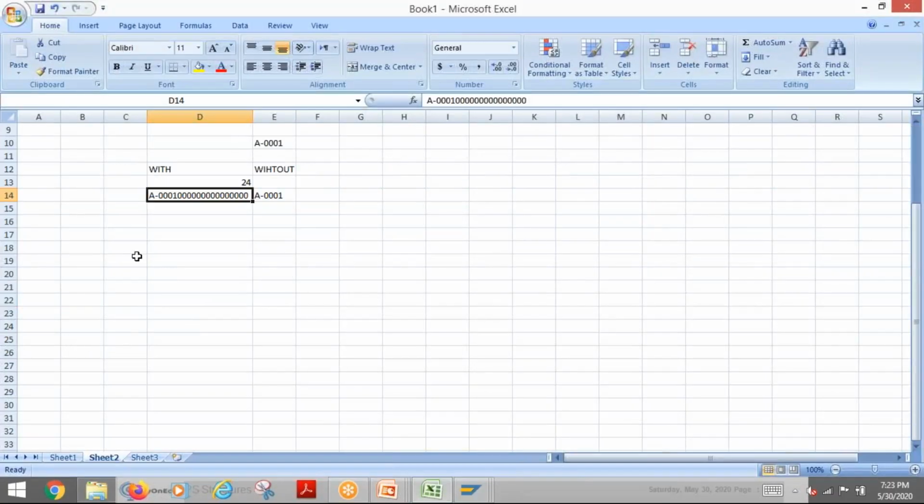If you look into your coding mask, you just do a search in OSS, you will find a note which says, for example, even if my PL is 2, I can use AB, but AC is not allowed. Not allowed because starting with A is only once.